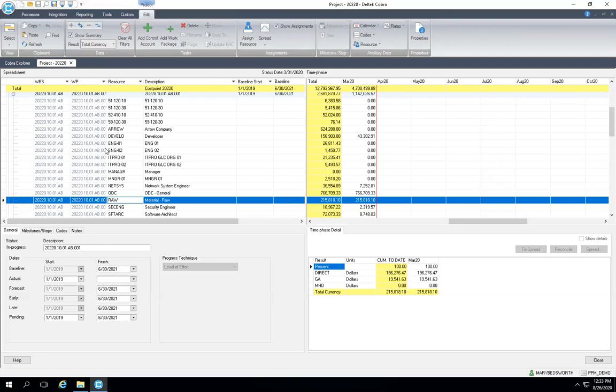If you get the data out of Vision, or when they go to Vantage Point, out of Vantage Point, and load it into Cobra, you have a lot of options. Cobra can do the calculations, apply the rates and factors, if you can't get the calculated values directly out of your system. That is an area where we hear a lot that they would like to see additional integrations with other products.